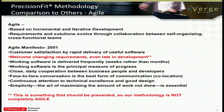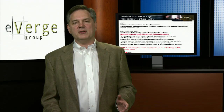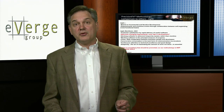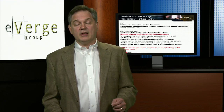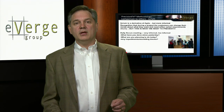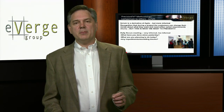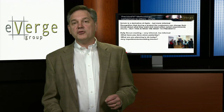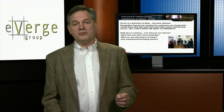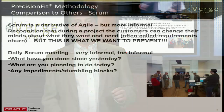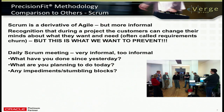Late requirement changes lead to dissatisfied clients. The Precision Fit methodology has adopted many of the key Agile elements that we view as positive. Another derivative of Agile is called Scrum, which also encourages requirements to evolve over time, but it's even more informal. You basically have a daily Scrum meeting where you discuss what you did yesterday, what you'll do today, and what your impediments are. Although there are nice collaborative aspects, it's too informal for us to execute with excellence for our clients.